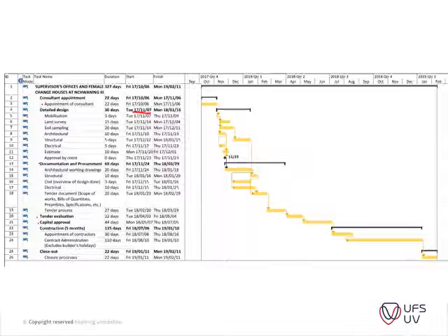capital approval. Many clients have capital approval stages. Then you go into construction. You can see it's a very short description of the construction. It only shows the length of the project, and then when the project should be closed out. So many times in these early stages, the client would say, I want to occupy this building by next year February, or next year July, whatever. And then usually you work backwards from that date and compile your master program that you present to your client.